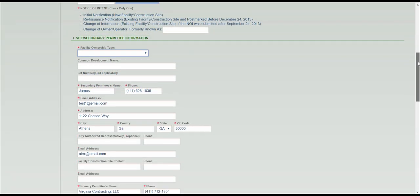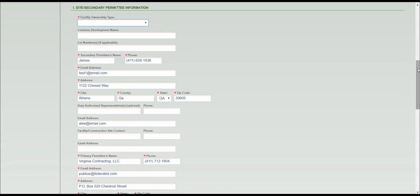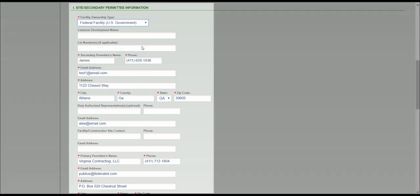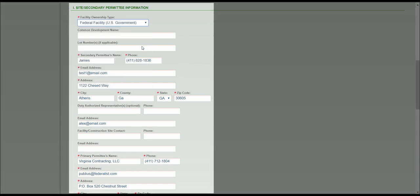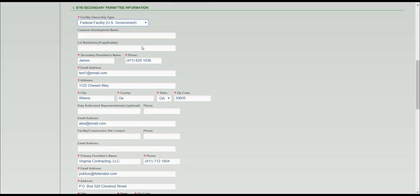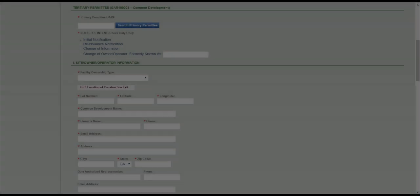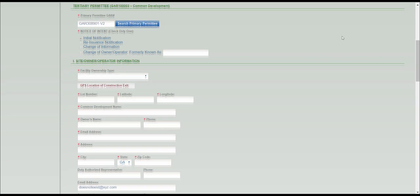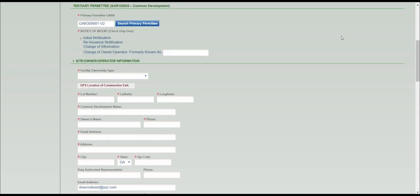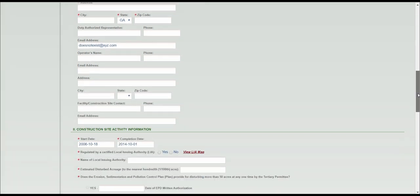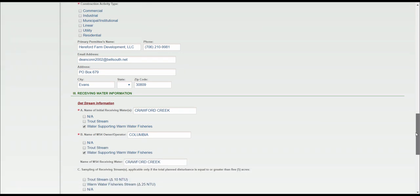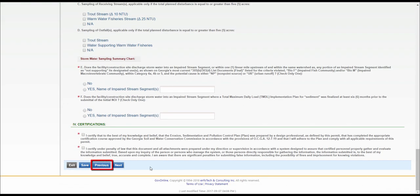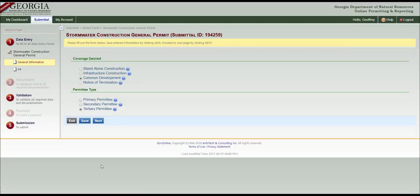Next, select the appropriate ownership type in the drop-down menu, and fill in the remaining secondary permittee information. If you're submitting a tertiary permit, there should be no active primary. If there is an active primary, then you should submit an NOI for a secondary permit. If you need to change the permit from a tertiary to a secondary, scroll down to the bottom of the page and select Previous. This will take you back to the coverage desired section.